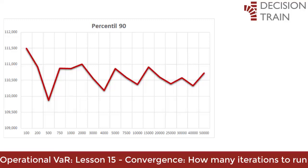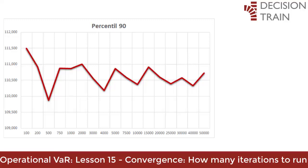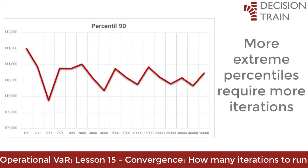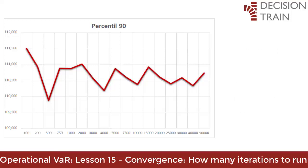If, instead, you are interested in a more extreme percentile such as the 95th, your iterations required to achieve convergence or stability in the results could be even higher. Since fewer samples are collected after the 95th percentile — by definition, only 5 percent of the iterations — more iterations are needed to collect enough samples to achieve convergence at the 95th percentile.